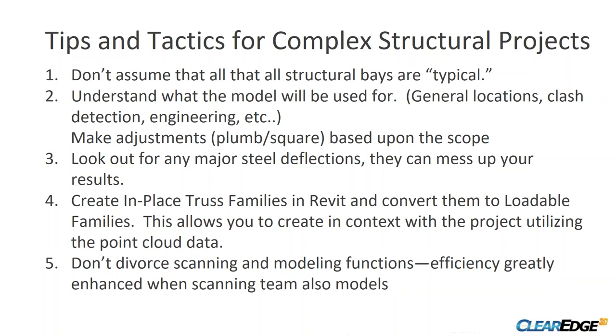Definitely understand what that model is used for. When I go into a situation for scanning projects, I almost always get the question, we have this building, we want you to scan it, how much is it going to cost? And I never answer that question directly with an answer, it's with another question. Well, what do you intend on doing with this project? Because that's going to affect how we approach it and just how accurate we need to be. So that discussion needs to be had because things are just not plumb, they're not square, and we need to know whether they care or not with the particular scope they're working with.